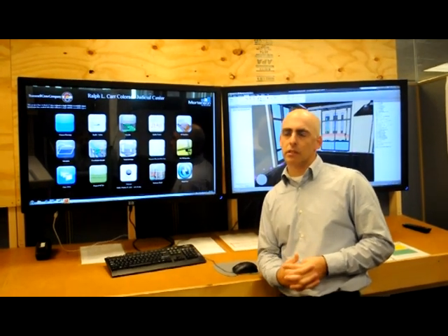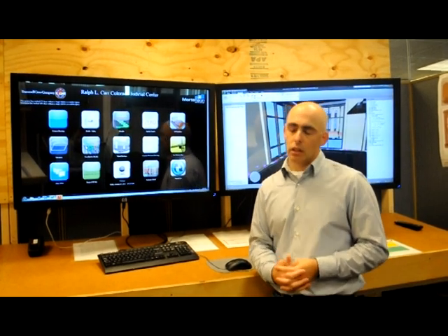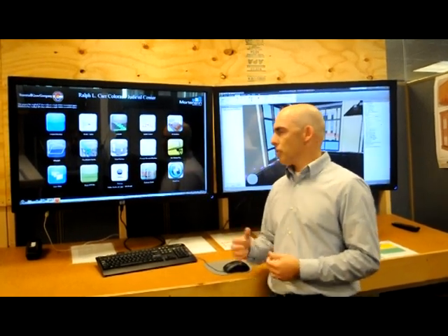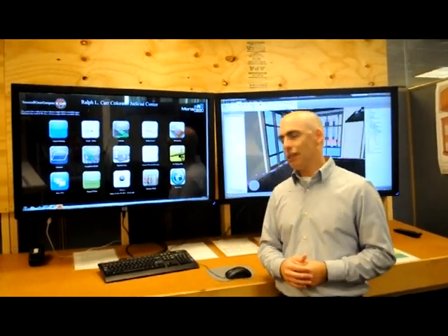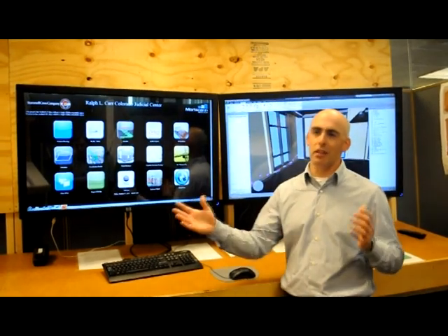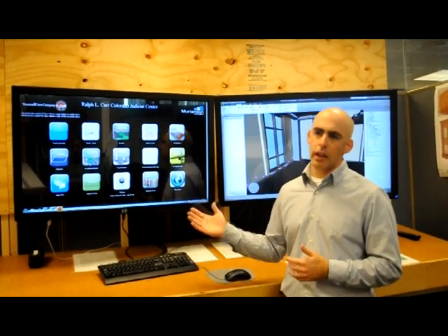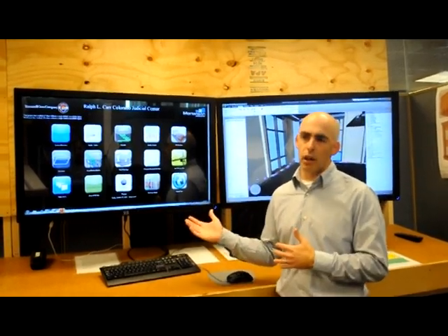And then I would also imagine that this allows you to ensure higher quality of construction, having the detailed drawings available through a tablet, say, out on the site. How has that affected the quality of the building? One of the great things about this is that it is available in the field. So there's usually not an issue of a set of drawings that hasn't been posted, or is out of date by a month, and there's a set here and a set there and maybe someone doesn't know which one. We get these things synced every day, so they're in the field as well as in the office.